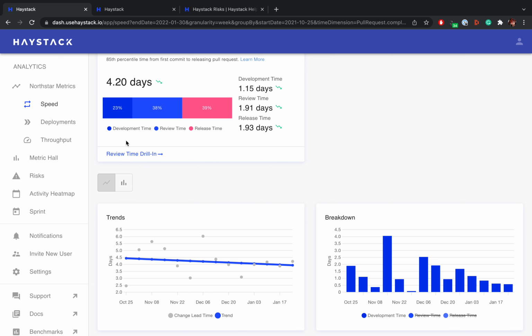actually the local developer experience. So often after someone has made a commit, they'll want to see what it looks like. Maybe after they share it, someone said, no, we need to make these changes, and maybe there wasn't enough clarity, but also maybe it's taking them ages to spin up that local development environment to see what they've done. Maybe their local unit tests, their pre-deployment process is just too bulky, it's taking too much time. Those are things which can often make this development time worse.